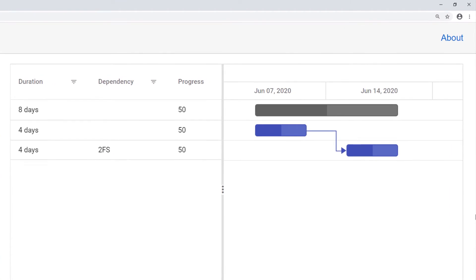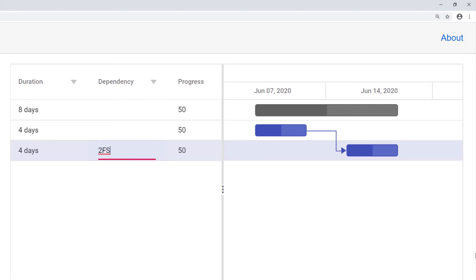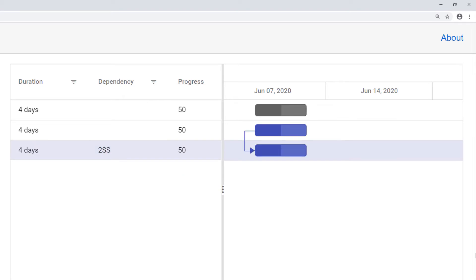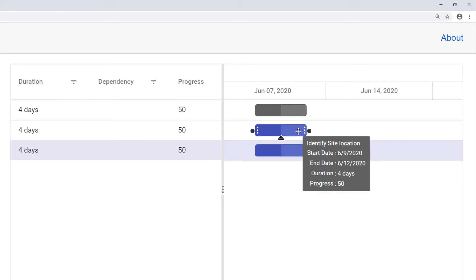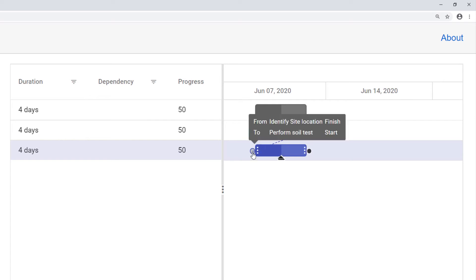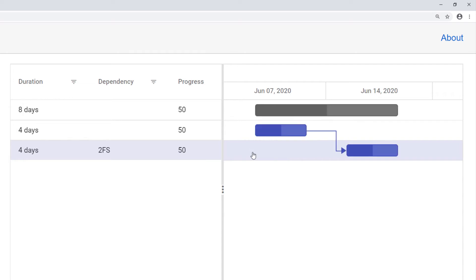Now let me edit the task relationship from finish-to-start to start-to-start in the dependency column. I edit the value and change it to 2SS. You can see the task relationship changes to start-to-start in the chart. Also, I can edit the connector line directly using the connector line UI. Let me delete the existing task relationship. In the taskbar, I hover over the second task and you will notice the connector points on both sides. I drag the end connector to the third task connector at the starting point. You can see the tooltip explaining the task relationship that is going to be established. I drop the connector, and you can see the task relationship has been established between tasks 2 and 3. If I try to establish an invalid task relationship, the connector lines will show an invalid icon.